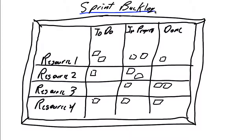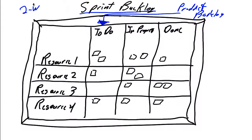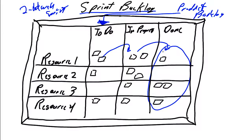During the sprint planning process, stories are removed from the product backlog based on the highest priority and moved over to the to-do column of the sprint backlog, where the sprint identifies the stories to be worked on in the next two to four week sprint. I like to have my sprint backlog identified with the resources as well. Just like we moved stories through the product backlog, we move stories through the sprint backlog — they start in to-do, move to in-progress, and then to done, so that by the end of the sprint all stories are in the done column.